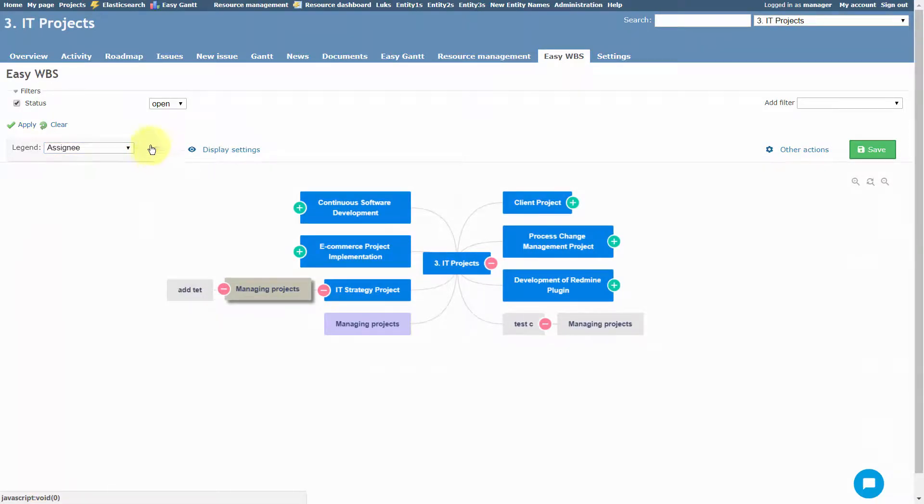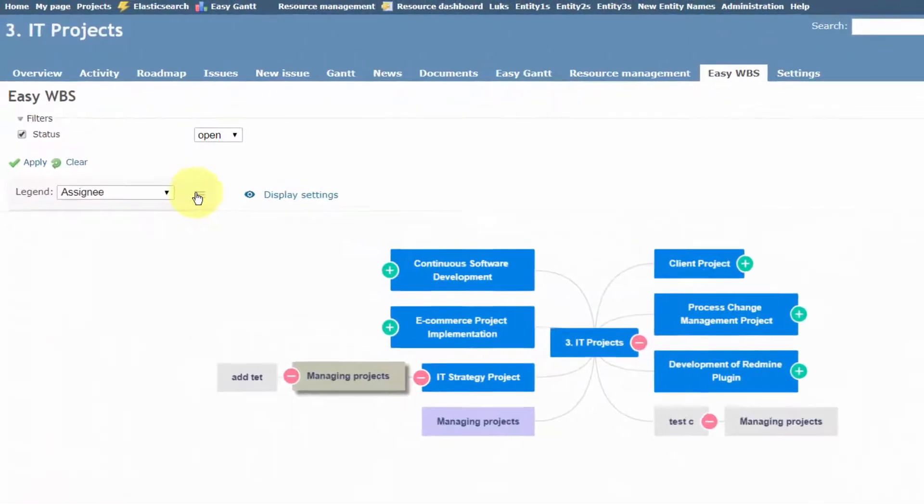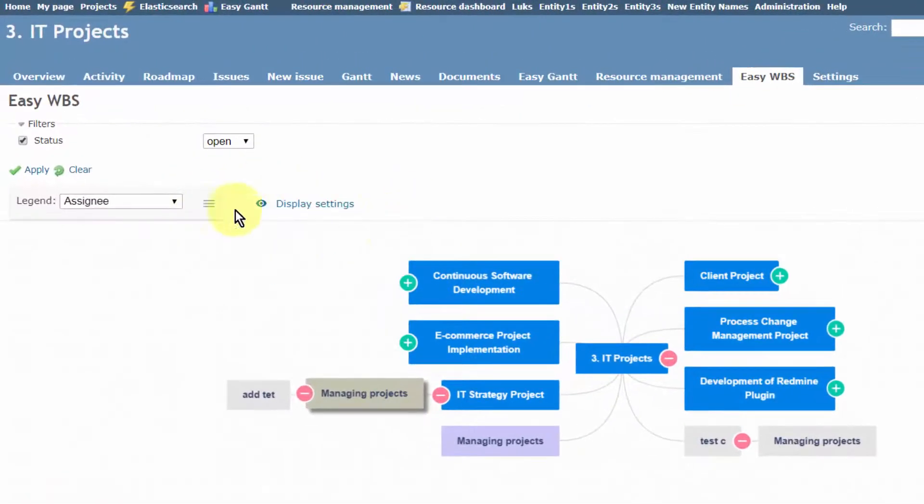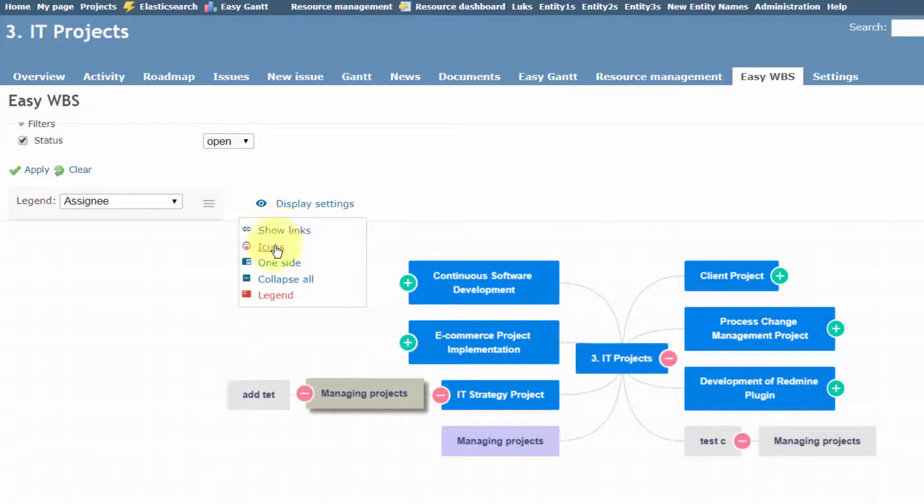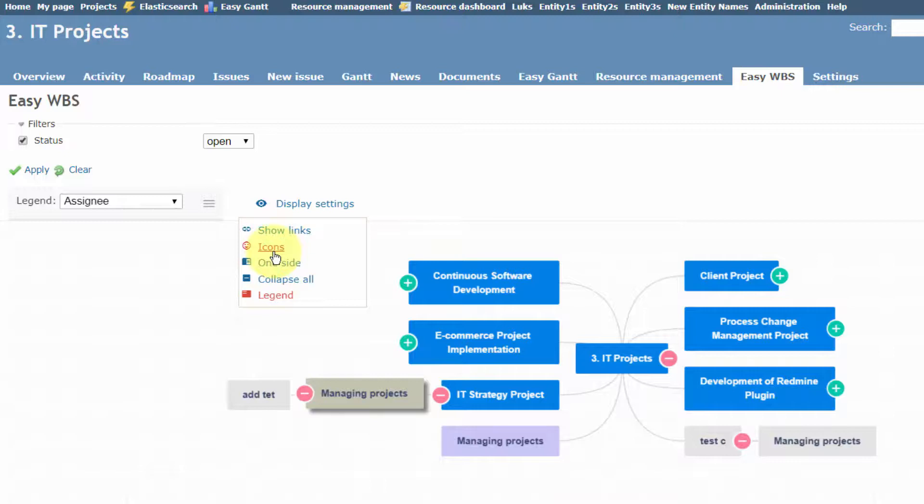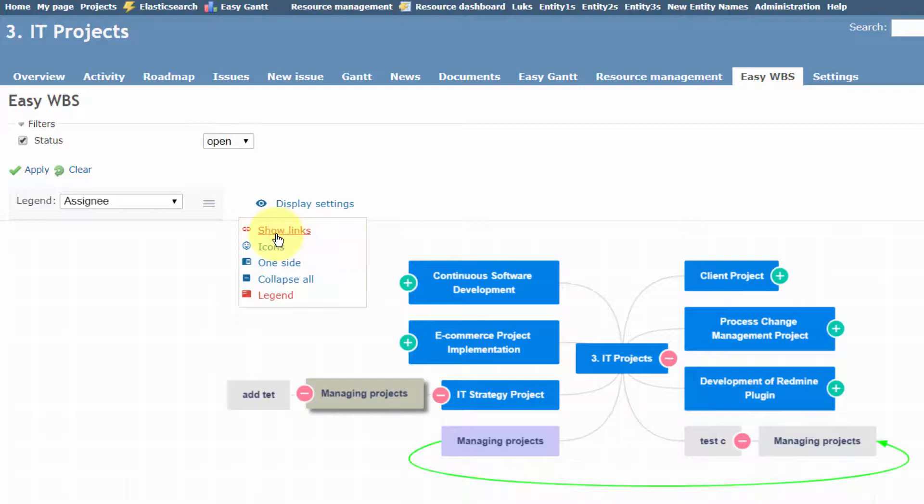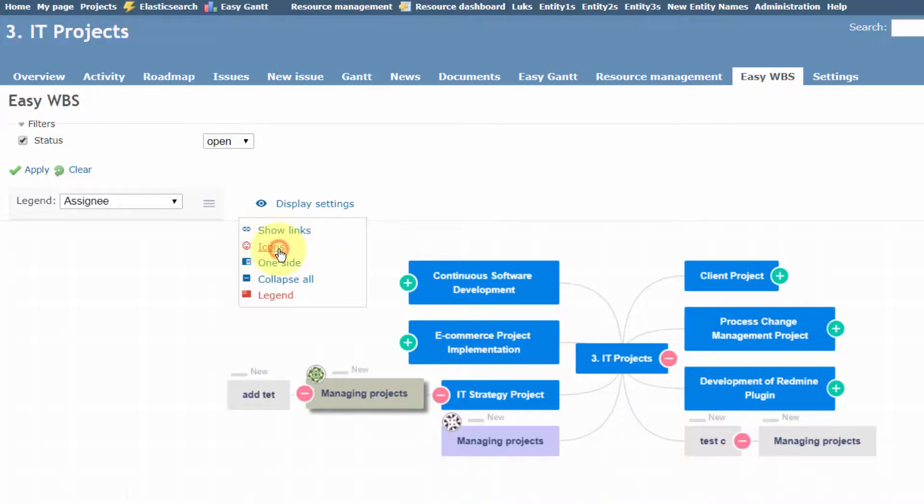There is an important icon called Display Settings, which allows you to make some information visible or disappear on the MindMap. To show relations between tasks, click on the first option in the list. The second option, called Icons, will add an information icon above each task, showing its current status.